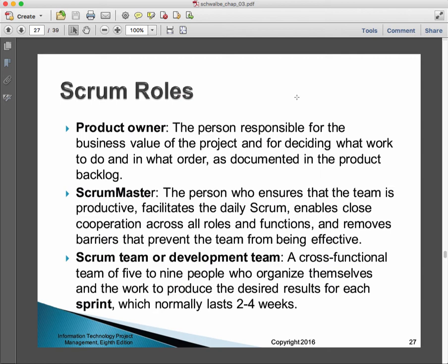Okay, so having a fixed length of time for each of the sprints puts a box around the time that Agile proponents believe has a really good effect on team behavior. Because when time is limited, okay, we tend to work on the most important things, and we have to concentrate on that. And what happens is that things that are less important don't get done.